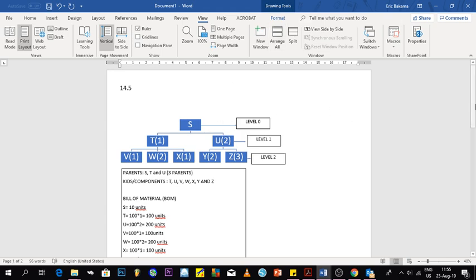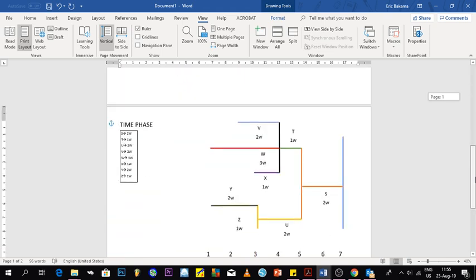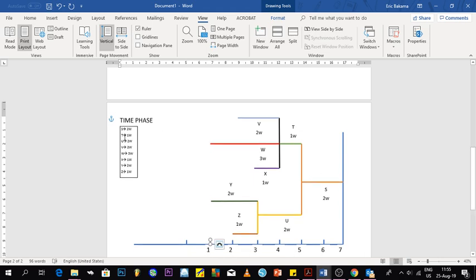You get all the information, and we also worked on the bill of material, which tells you exactly how many materials you're looking for for the component that you want to build. The key information here was mainly the lead time, which tells you how much time elapsed between the moment you have placed an order and you have received it.